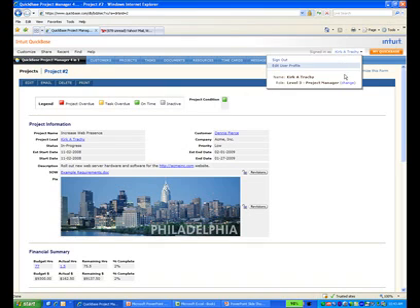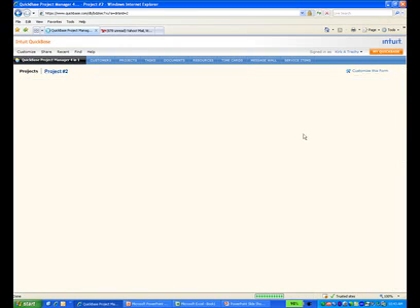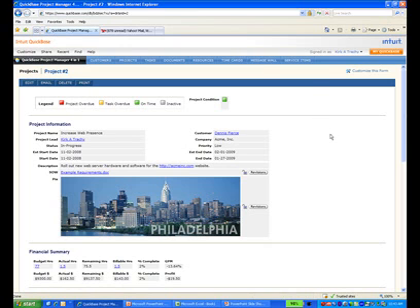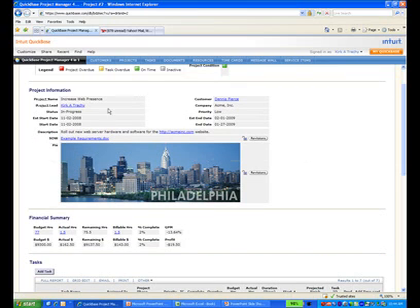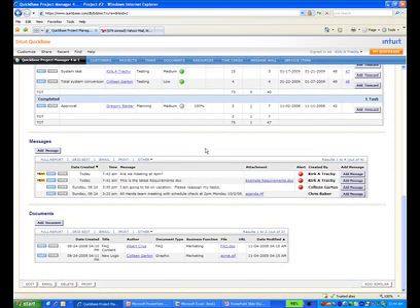There's one other component to it. You can increase the functionality of this to, let's say, project level 4 anytime you want, and it provides an additional layer of functionality, which includes keeping track of billable hours versus non-billable hours, gross profit margin, and profitability. And notice there's one other item that's added to this process here, and it's called service items. You can keep track of different billing rates for different processes, but all the information is here. The same information.